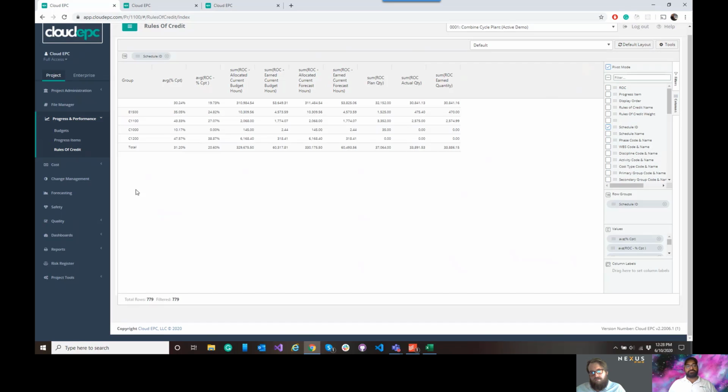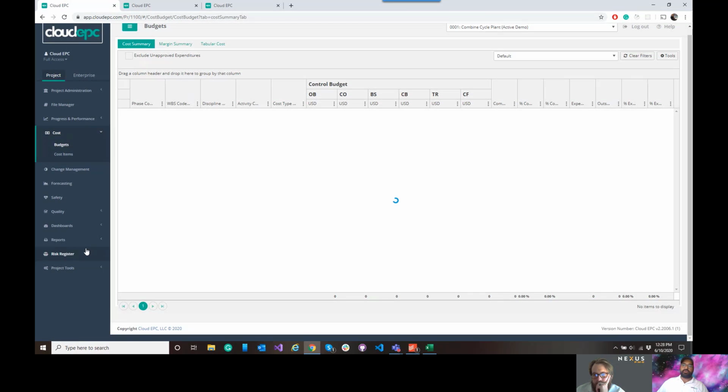And we can keep those systems in check between 2 databases. There's a really nice little export that you can do right to Excel and import it into Primavera. And if you're using web services, we do have a beta at this point where we can integrate with Primavera through web services. And so the grand scheme of things, all of this gets rolled back up into our budgeting module, and all of that data becomes available in our reporting module.